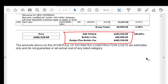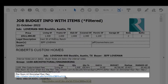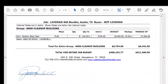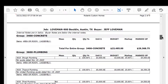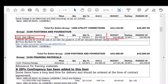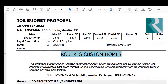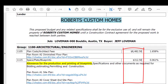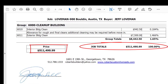This comes down as a cost plus builder fee. The Loveman job is a fixed price job. I printed one that has internal notes in italics and buyer notes, showing both the budget and the marked-up amount. For a fixed price job, when you give the budget to the home buyer, all they see are the marked-up amounts — it doesn't say the word 'markup' or 'budget.' Those amounts total to their price right here, giving them their proposal.